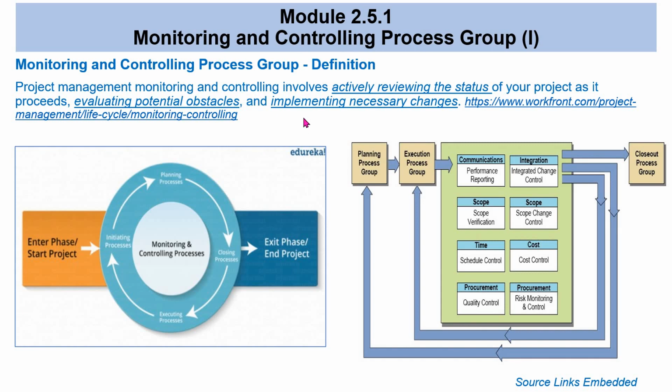However, know that the monitoring and controlling process group does not necessarily wait until you start executing. It actually starts from the beginning, because even while you're trying to initiate, you're doing some level of control and monitoring to see that you define the right set of things at the beginning. And you monitor and control what kind of plan you want to put in place. And when you're executing, the level of monitoring and controlling activities becomes even more.